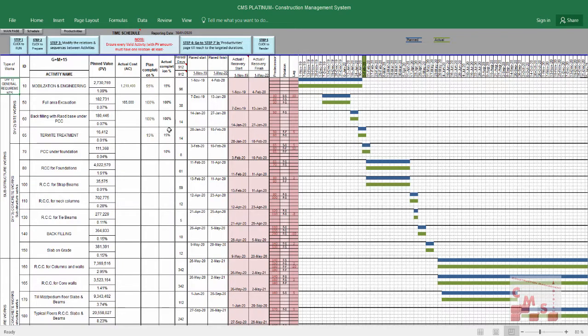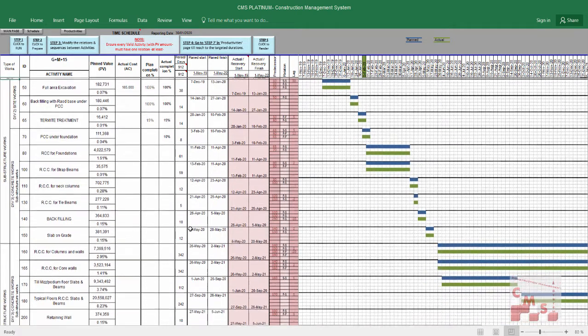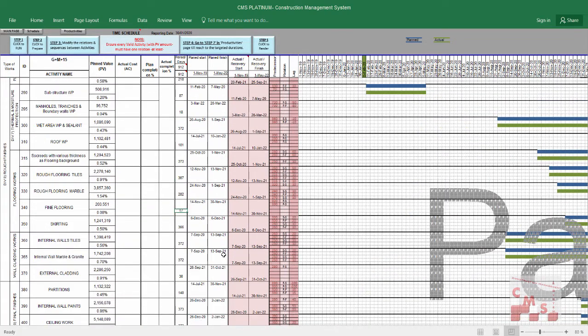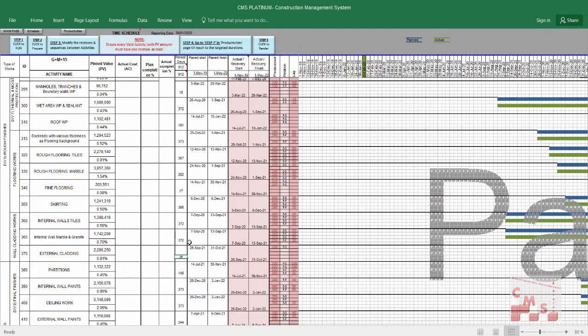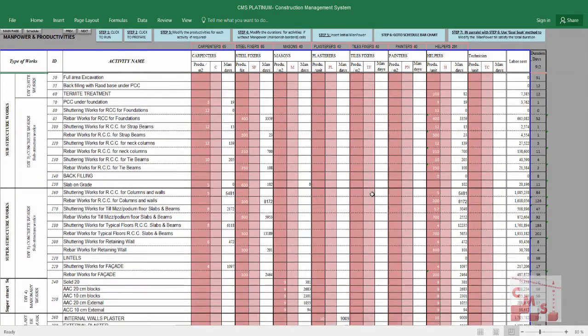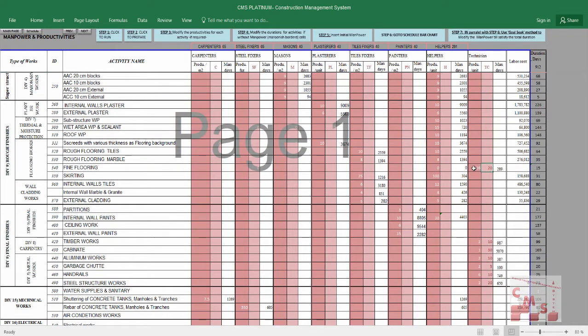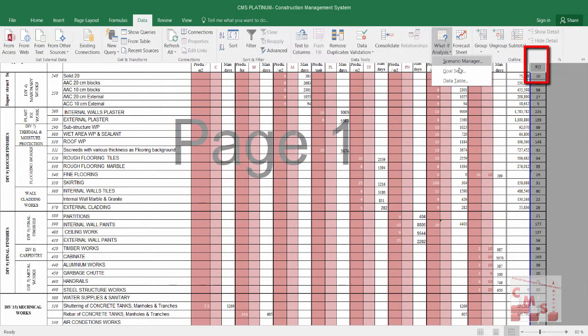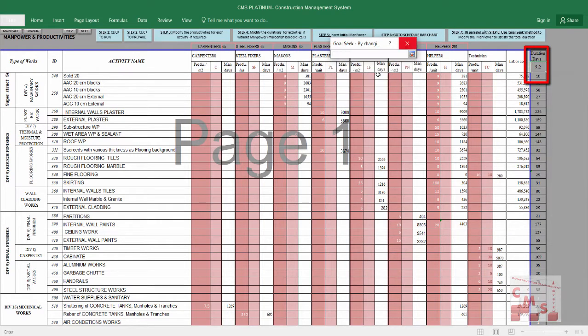We'll have a look at the schedule, and again let's see which have unaccepted duration. Maybe the fine flooring and external cladding have very little duration. We can change that also in the productivity by increasing the manpower if the productivity is okay for us. So let's change the manpower. We can provide maybe 10 and they can finish this way. As we said, this number is changed, so we need to change the manpower, instead of 65, by goal seek: 900 days by changing this cell.